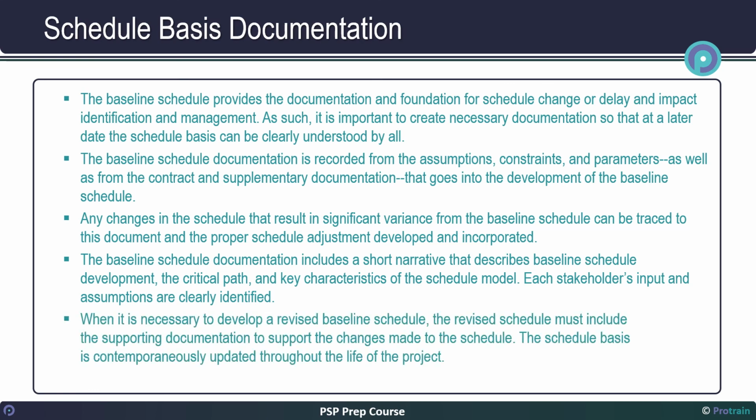When it is necessary to develop a revised baseline schedule, the revised schedule must include the supporting documentation to support the changes made to the schedule. The schedule basis is contemporaneously updated throughout the life of the project.